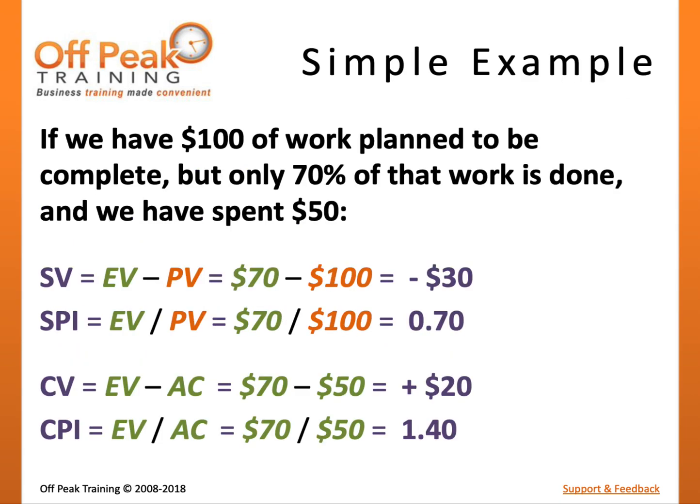For example, if we planned to be done with $100 of work but only accomplished $70 of work, our Schedule Variance will be negative $30 and our Schedule Performance Index will be 0.70, meaning we are behind schedule. If it only cost us $50 to accomplish this work, our Cost Variance will be positive $20 and our Cost Performance Index will be 1.4, meaning we have good cost performance — we are under budget.